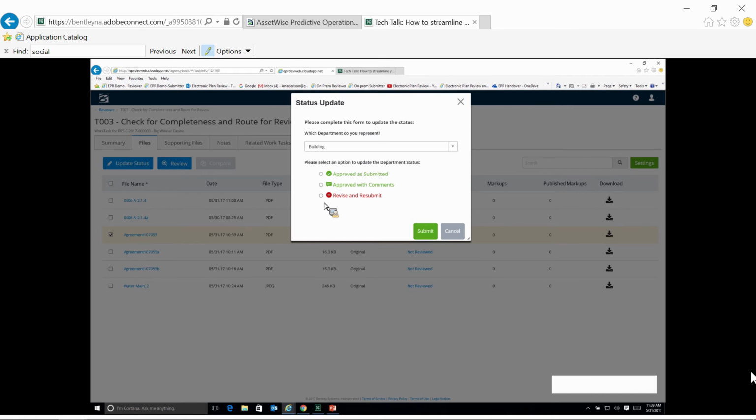For streamlining and system performance, if you only need 3 pages revised, you only mark those, you only send those back, and the applicant only uploads those 3 files. They don't upload and move the whole 100-file package every time. That gets confusing. It's also a bandwidth killer, and there's really no need for it. So that's why we go file by file.